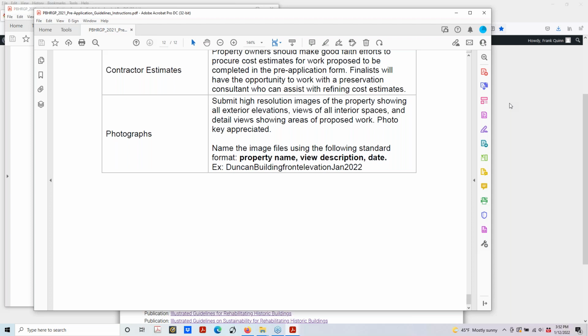And Joyce, this is Mary Beth. I'd like to just chime in on this. Since this is a reimbursement grant program, we do encourage projects to find a way to finance all of the costs up front and plan on getting reimbursed at the end, with potential reimbursement during the project, but largely we ask that you plan on financing it up front and get reimbursed. That doesn't mean you have to have that all settled by February 14th, but by the time the project starts, that would be wise to have that arrangement clear on everybody's part.